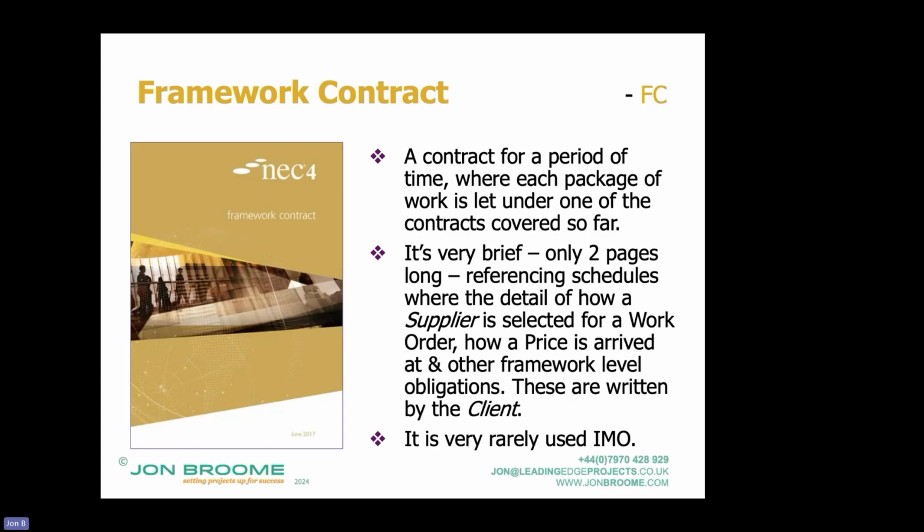So under EU procurement regulation, the standard was 4 years. We're still just about subject to EU procurement regulations because we have an Act of Parliament which reflects those directives, but that's about to be replaced. It was 4 years unless there was a good reason otherwise, and you could invent a good reason otherwise, pretty much.